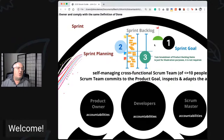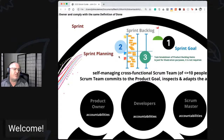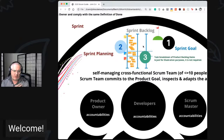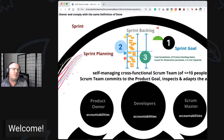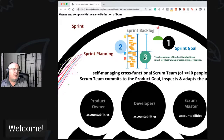You can see three items from three different projects, each with multiple tasks, and the team can use a Scrum board or Kanban board. Topic one is why are we doing this work — what's our objective? Topic two is what are we doing? Topic three is how are we doing it? The sprint goal doesn't have to be settled at the end of sprint planning, because when you get into the detail on the 'how' you might realize you can do more work or it's actually less work needed.